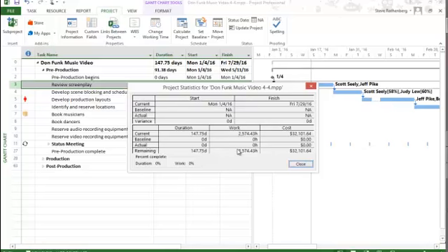So this is what a project looks like from the start. It actually hasn't started to run yet. So when a project starts to run, you may not be making as much progress as you thought. So this may end up being current duration expired, maybe 50 days, but you still have 100 days worth of work remaining, and you can see that 100 days remaining and 50 already spent means that you're already a few days late, because if things keep going the way they're going, you're going to end up spending 150 days on this project instead of the 147.